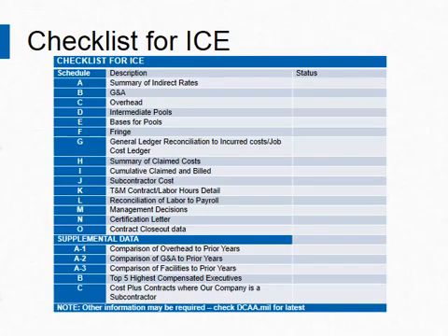Schedule O is for contract closeout data. The contract has to be physically complete, and what they're looking for is, have you invoiced all your cost, and are we reaching a point that at some point in the future we're going to come out and you'll do a contract closeout and we'll get that done. So it's kind of like planning for them more than anything else.